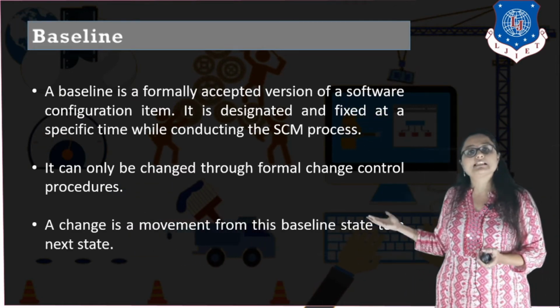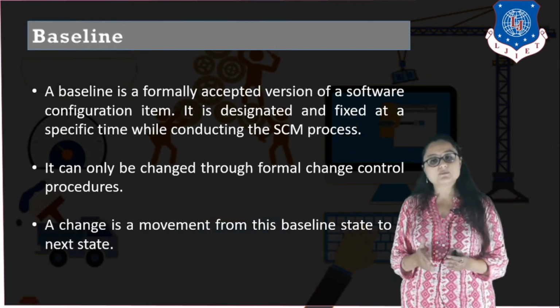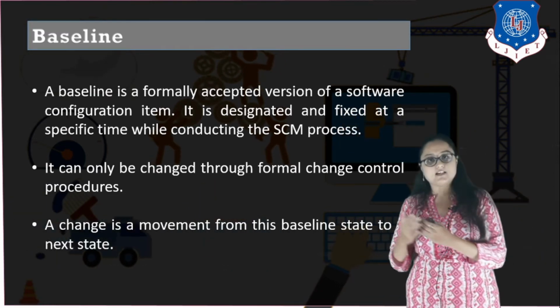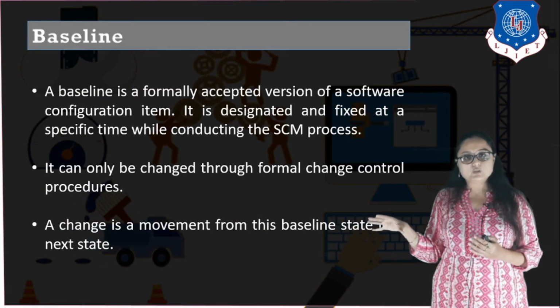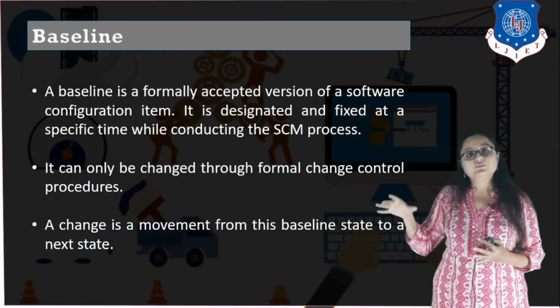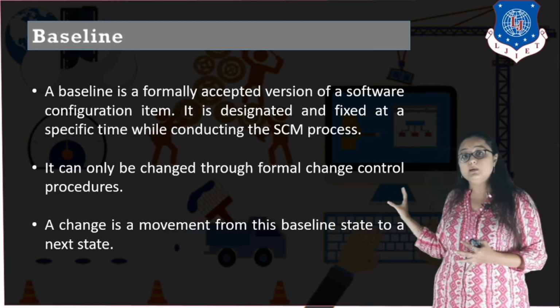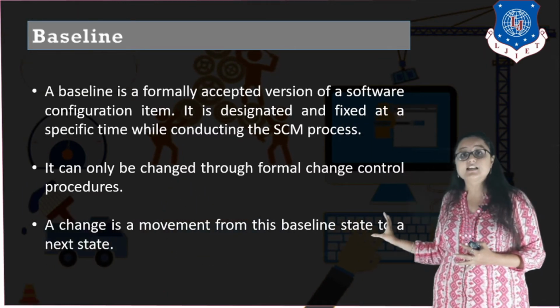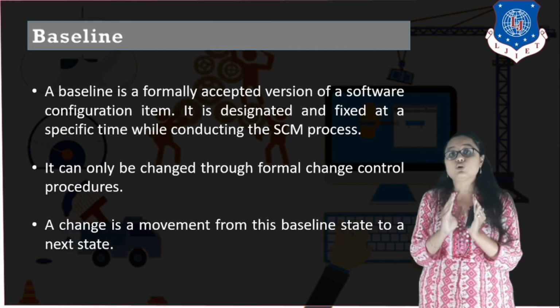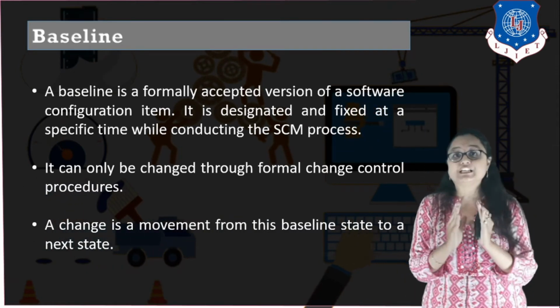So change, what is change? Change is a movement from this baseline state to a next state. Right, so you have a particular state of database design. If you want to alter that design, and if that particular state is a baseline state, you will have to follow a formal procedure of change control. Right.